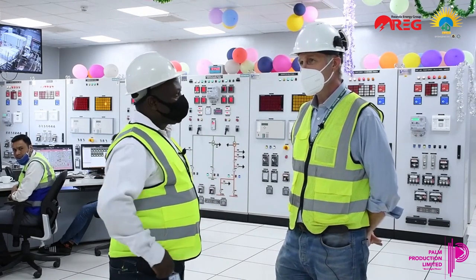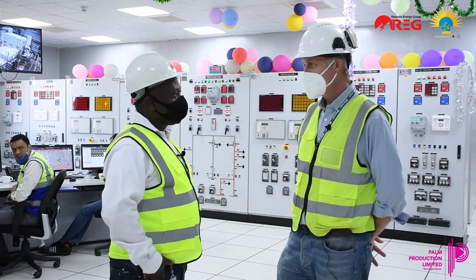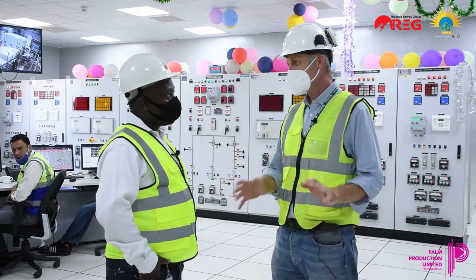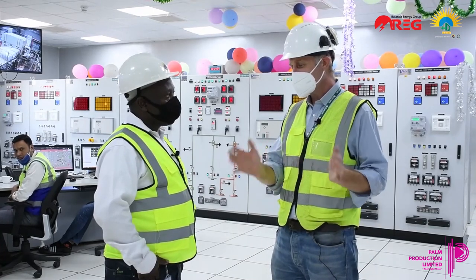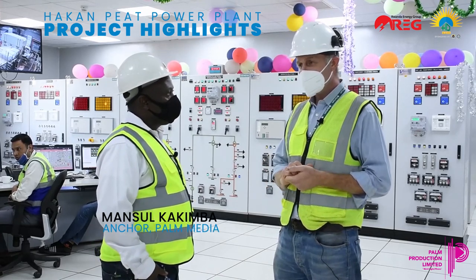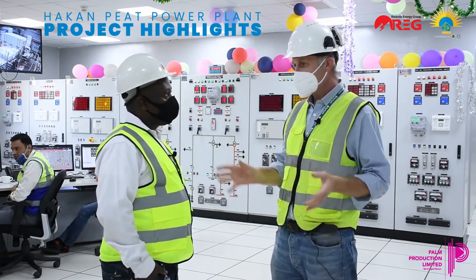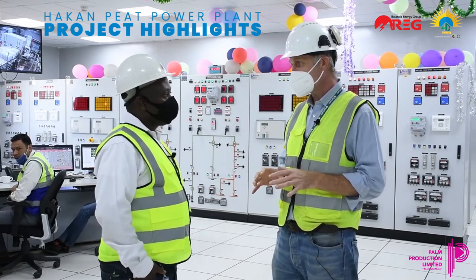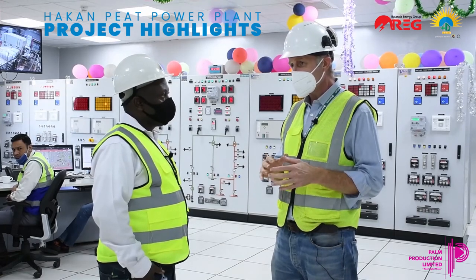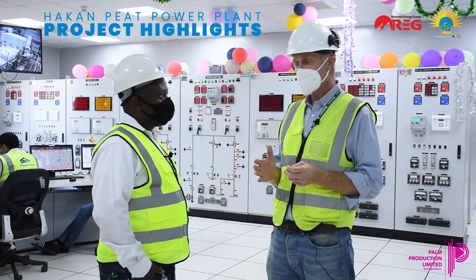Okay. So, basically, there are two shareholders, one London-based called Quantum, one Turkish-based called Hakan. They have been investing the equity required to complete the construction of the project. We have nine lenders headed by AFC, the African Finance Corporation. They were the lead arranger and they've organized $250 million of debt for the project. We're grateful to them as our partners. So total project cost is $400 million investment to get us up to commercial operations.